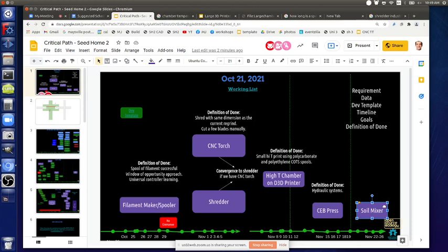If you count, it's 2 days with 12 people, so think about 24 man days. So we've got eight, now that would be three. That's if you've got eight, 3 days. So I'm thinking maybe the morning of the first day, we'll do an overall: this is a CEB press, these are all the subsystems that make it work. There's the mechanical, there's the structure, there's the hydraulic system, there's the controls. Everybody kind of gets the stage set.